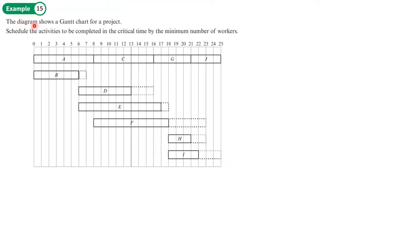Example 15: the diagram shows a Gantt chart for a project. Schedule the activities to be completed in the critical time by the minimum number of workers. To find out a lower bound for the minimum number of workers, I need to work out the total time of the activities divided by the critical time. I can see the critical time is 25.